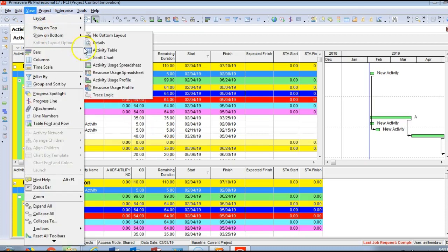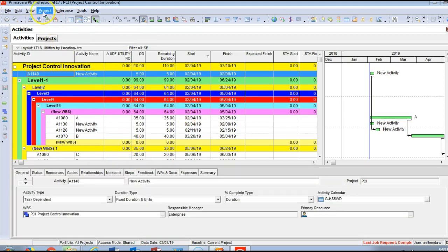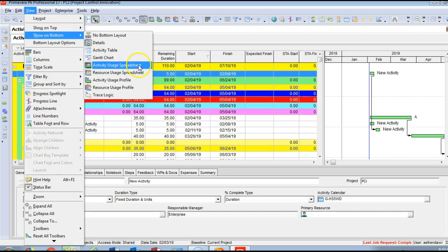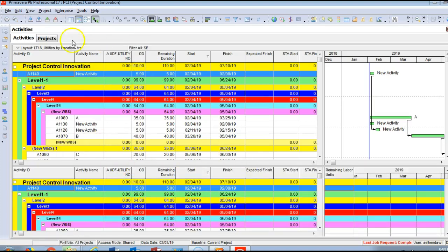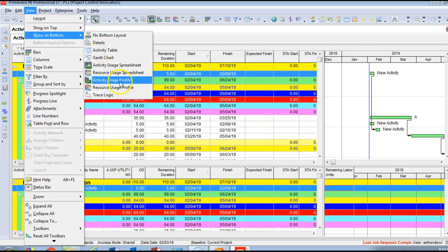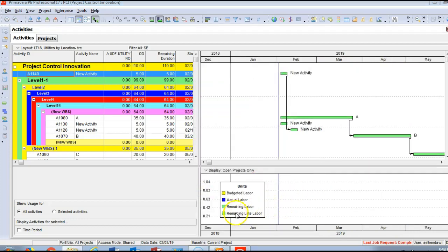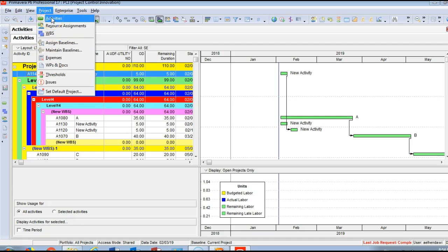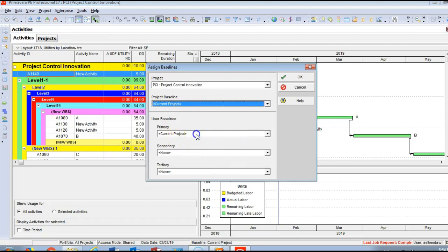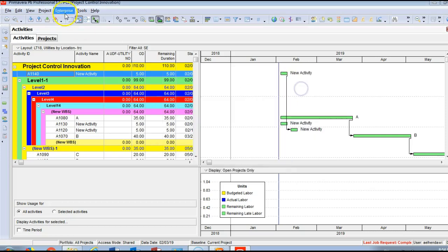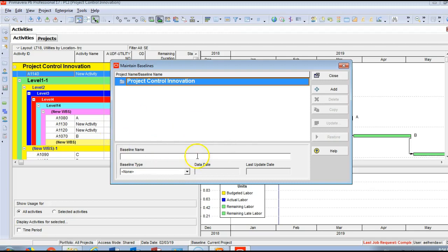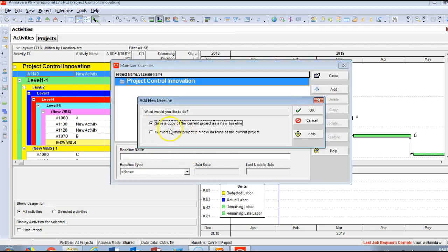Under View you can also show Activity Usage if you have resources, and Activity Usage Profile where you can view remaining labor. Under the Project menu you'll find Activities, Resources, WBS, and Assign Baseline — where you can assign a primary baseline. You can also use Maintain Baseline to save a copy of the current project as a baseline.